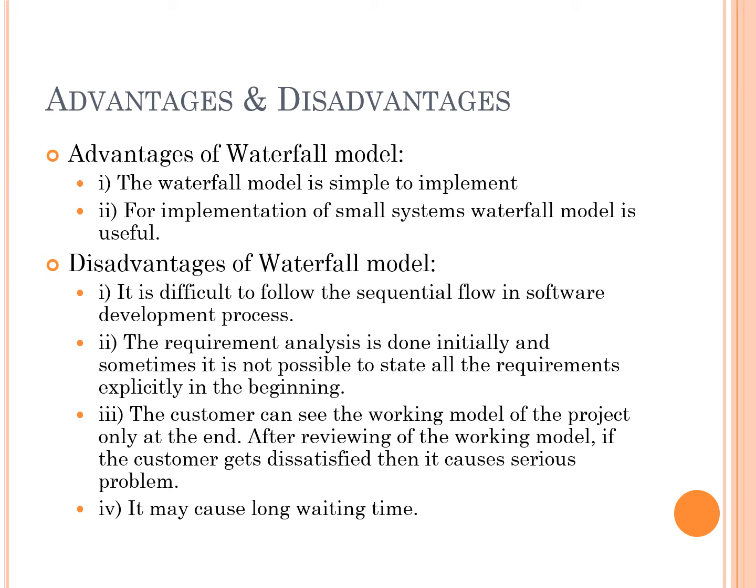Linear nature of waterfall model induces blocking states because certain tasks may be dependent on some previous task. Hence, it is necessary to accomplish all the dependent tasks first. So, it may cause long waiting time.